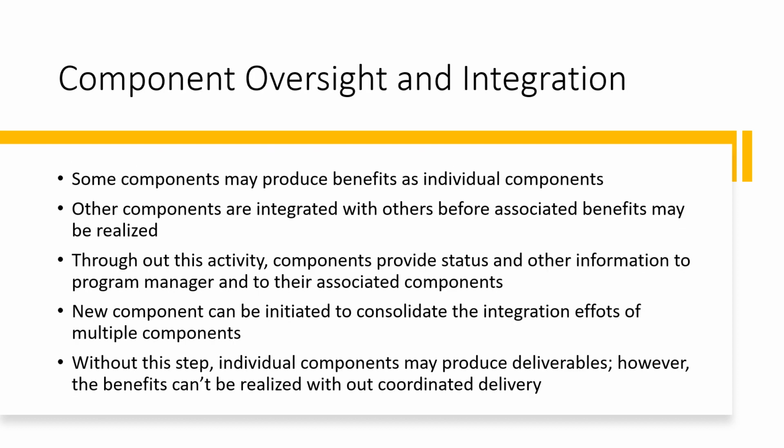The second sub-phase of the program delivery phase is component oversight and integration. How am I going to oversee my components and how am I going to integrate them? Some components may produce benefits as individual components, but other components are integrated with different components before the associated benefits are realized. Some components will give individual benefits. Some components may not deliver on their own. Only when integrated with other components will they get the associated benefits. So you need to deal with them accordingly.